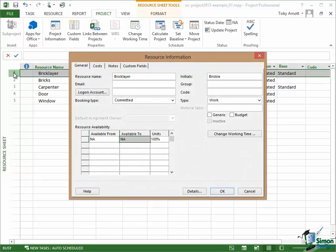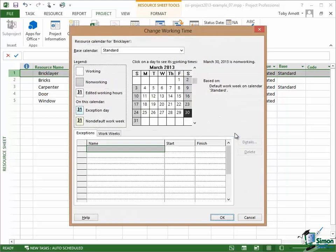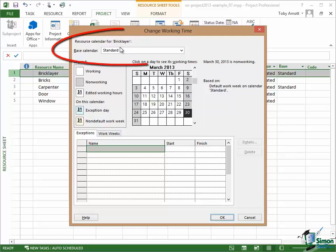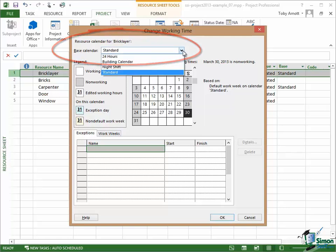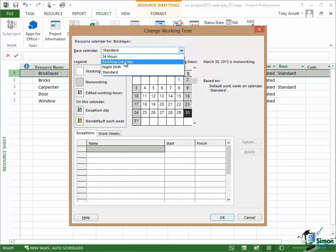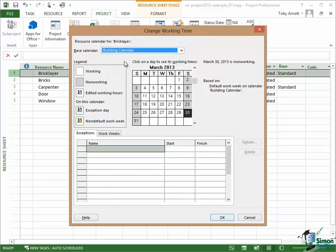Open up the resource information for Bricklayer, and in terms of working time, if I click on Change Working Time for Bricklayer, I'll see that the resource calendar for Bricklayer is currently set at the standard calendar. Now I want to change that to be the building calendar.